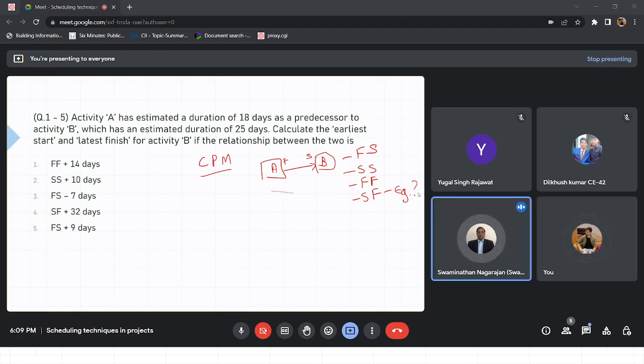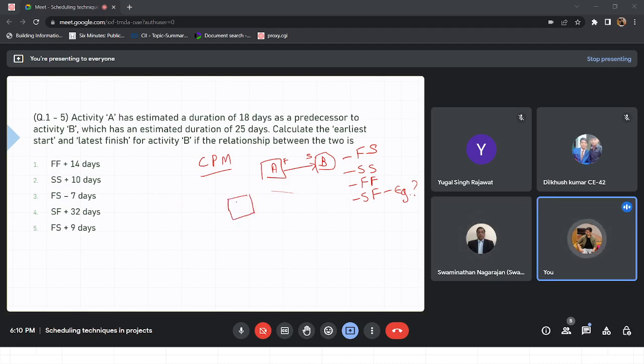In my IT work, when we decompose a project into components, we start a design of one component and another component simultaneously. So that's almost start to start. Both of them will be finish to start with respect to requirement specification. Okay, so let me try to visualize what you have just discussed. Let's say we have design 1 and design 2, and they can go in parallel.